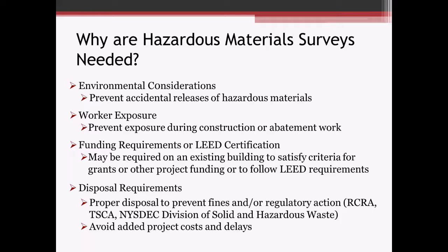You also might have some funding requirements, LEED certification. Certain projects are going to have grants applied to them that are going to be tied to having a hazardous material survey done before they release the funds. LEED certification is also a big one if you want to get credits and make sure you're dealing with your hazardous materials appropriately. So the first step in doing that is to do that hazardous material survey, identify the hazards, and then you can put together the plan of action to take care of it.